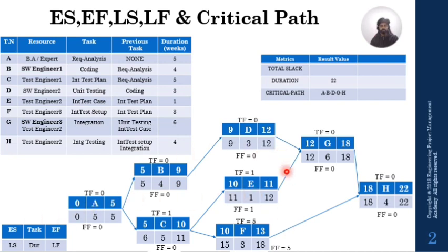Now you have plotted down the critical path. We saw in the previous videos how we formed the critical path with the same example. Now the critical path is A, B, D, G, H. Now we know this engineer, engineer E, is not available. So you go ahead and see how your project is affected. The first thing you should think, once you come across the fact that one of the team members is not available, is to go back to this network analysis and see what happens to the project if this engineer E or this activity is jeopardized.